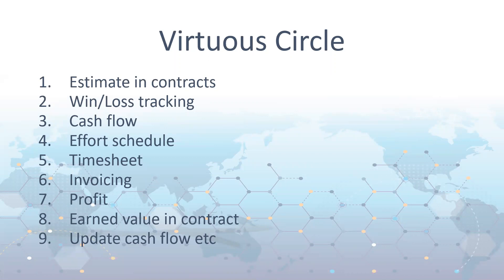If you do win the job and you've got your contract estimate in the system, that will automatically flow through to people's timesheets so they can automatically timesheet to those contract deliverables established in the estimate. There's no more work needed to set up the job — it's already set up from the estimate. Those timesheets allow actuals to come in against those deliverables and people are able to estimate how much is remaining.